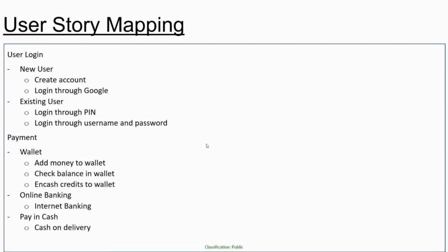So let's say that you have a checklist like this, which is applicable for each and every user story, that it has to follow these particular steps in order to reach the final state of done, or it should be thoroughly tested, or it should be thoroughly validated, and all these things when you put in a checklist. Okay, and you say that every user story should have passed through each of these conditions mentioned in the checklist, only then I will consider this user story to be complete. That checklist is something which is referred to as definition of done.